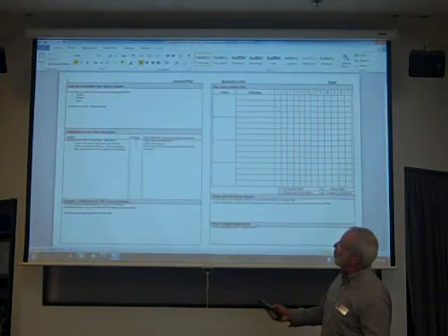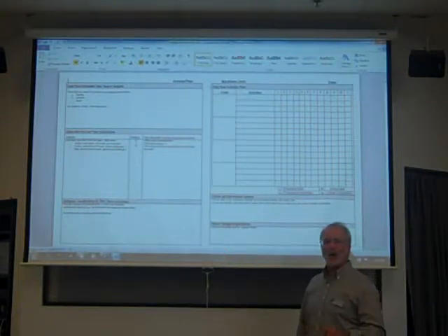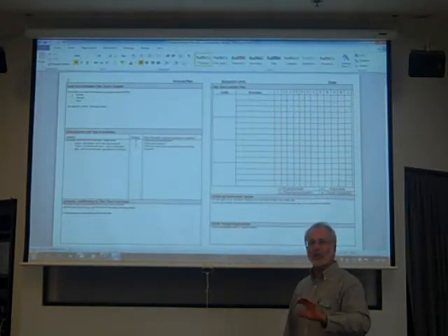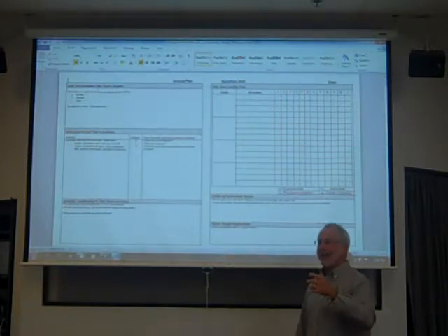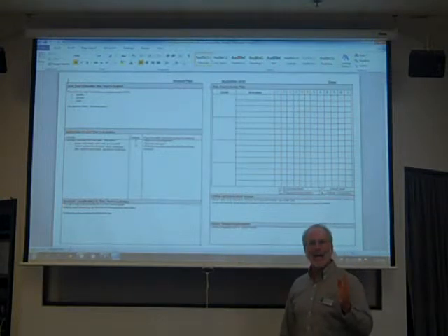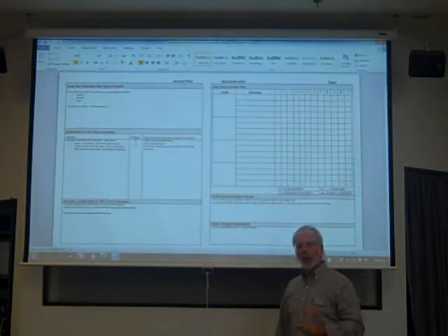And we just identify what the activity was, and then we give it a rating. And in this case, the rating code is red, yellow, or green. Obviously, green meaning was successful, we did it well, we accomplished what we set out to accomplish. Yellow, we're kind of on the fence, some things went well, some things didn't go well. And red, crash and burn, we didn't accomplish or that activity didn't do what we wanted it to do.